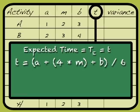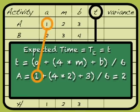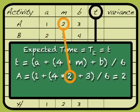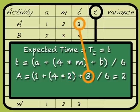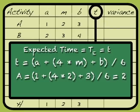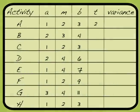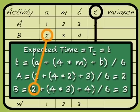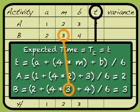For activity A, we substitute in our time estimates: optimistic time of one, plus four times the most likely time of two, plus pessimistic time of three. That adds up to twelve, divided by six gives us two. We can fill in two on our chart. For activity B: two is the optimistic time, plus four times the most likely time of three, plus four which is the pessimistic time — that adds up to eighteen. Divided by six, our expected time for activity B is three.